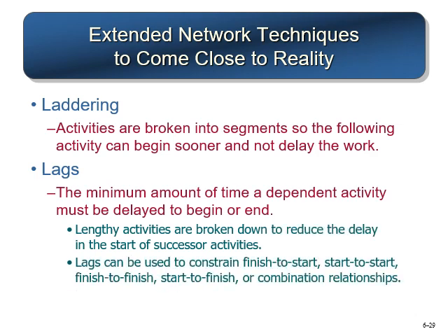Now, laddering is a concept which is used in many project activities. Activities are broken into segments. So there is an activity A and activity B. It's not always necessary that activity A has to be totally completed before you start B. So maybe part of it is completed before you start activity B. So that is called laddering. If you see a ladder over here, maybe after 2 steps you can start activity B. So that is the concept of laddering.